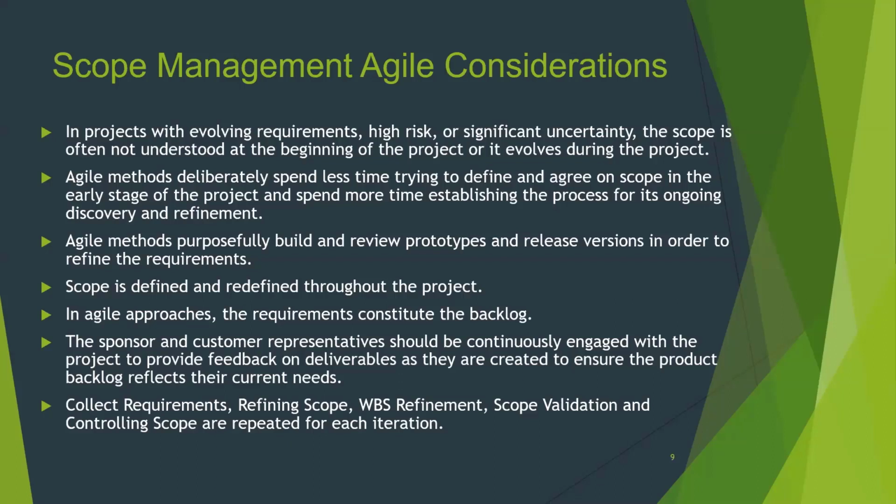So co-location, you might come across in the materials, means having all your resources in one location. And a lot of times in an agile project, they'll be in the same room working closely together. So to answer your question, yeah, agile lends itself well to smaller teams, 6, 8, 10, no more than 12 people working on a team.